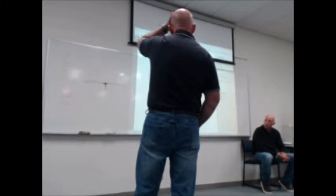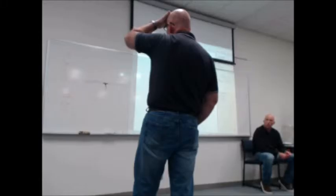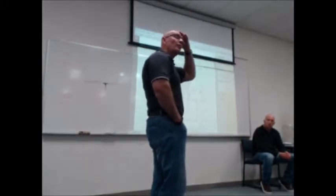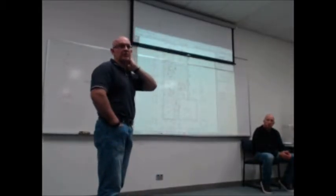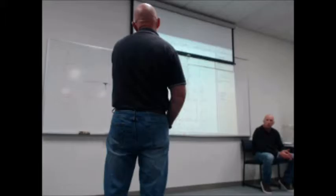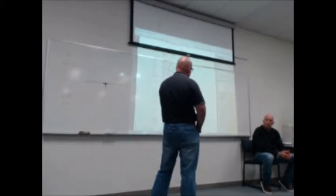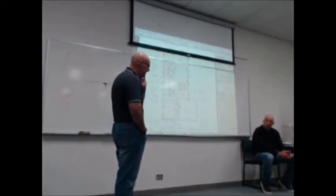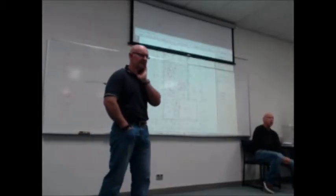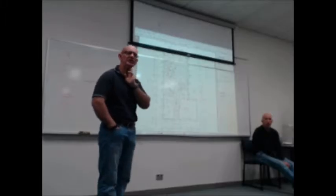What's about 150 bucks for the salt, plus the labor, 2 trips. Let's say 20 bucks for the gun for waterproofing, including labor and material. About 20. 400 bucks for the waterproof. No kitchen, kitchen's not a wet area. What area? Last time I got it, it was about 160-180 bucks for a 4 liter drum. 4 liter or 10 liter? 10 litre. Oh, I was going to say, yeah, we've got the 10 litre. 10 litre drum was about 40 bucks. Oh, it's 50 bucks.